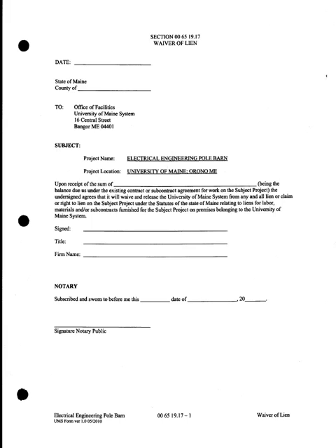So if they don't have the money to pay their subcontractors, the subcontractors won't sign a lien release, in which case the contractor can't get paid, so it becomes this vicious circle. So we kind of reword that to say, upon payment, I release any liens on this, and that way we can make sure that everything is taken care of.